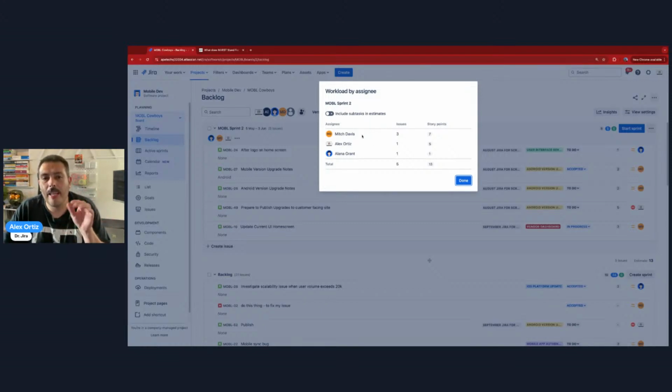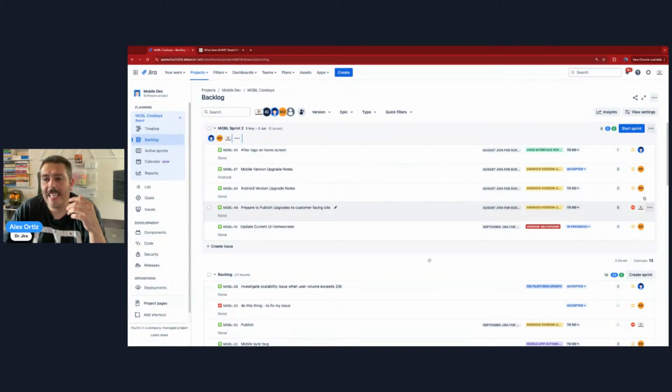Well, this view here will show you each player, how many issues in total they have, and then how many total points they have. So this gives you a great view so that you can see, based on historical data, am I tasking my team members just right, under, or am I over? And only if you assign the work will this picture pop up. Because if you didn't have any assignees here, you don't get those 3 dots. So food for thought, again, before you get mad at me for saying assign your items, but that's just food for thought.